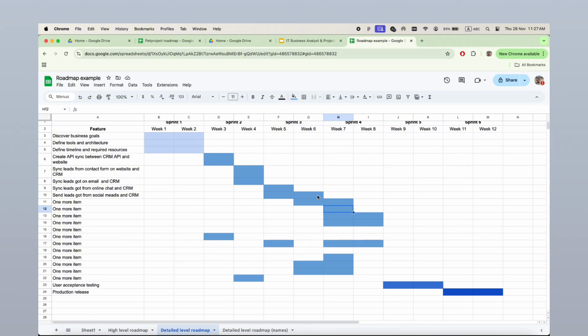We should have sessions with the team like pre-groomings and groomings, and exactly during the groomings we estimate the tasks either in story points or in hours, whatever approach your company is using for estimations. And having tasks estimated, you can easily plan and at least foresee how much time it will take to complete each task, and just display this on the visual timeline.